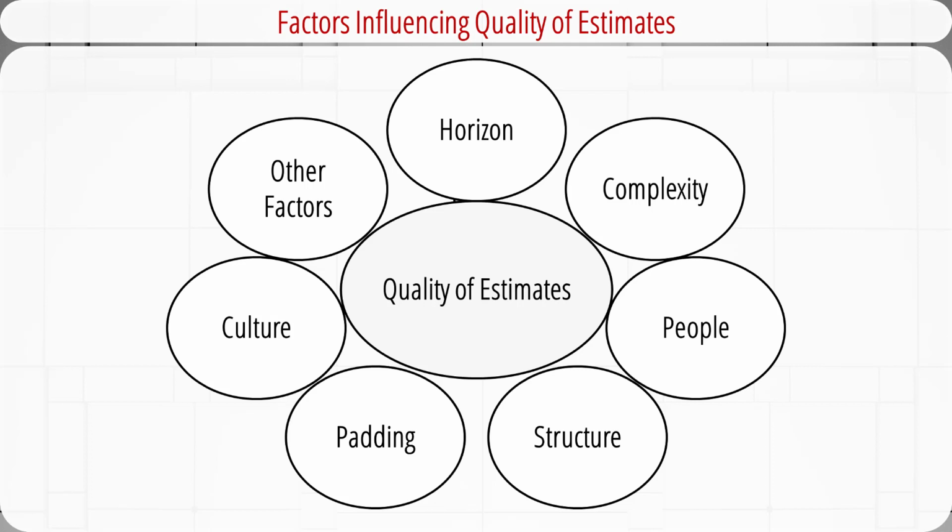In work situations where you are asked for time and cost estimates, most of us are inclined to add a little padding to increase the probability and reduce the risk of being late. If everyone at all levels of the project adds a little padding to reduce risk, the project duration and cost are seriously overstated. This phenomenon causes some managers to make a 10 to 15% cut in the estimates. But the next time the game is played, the person doing the estimating will pad the estimate to 20% or more. Therefore, such games will reduce the quality of realistic estimates.